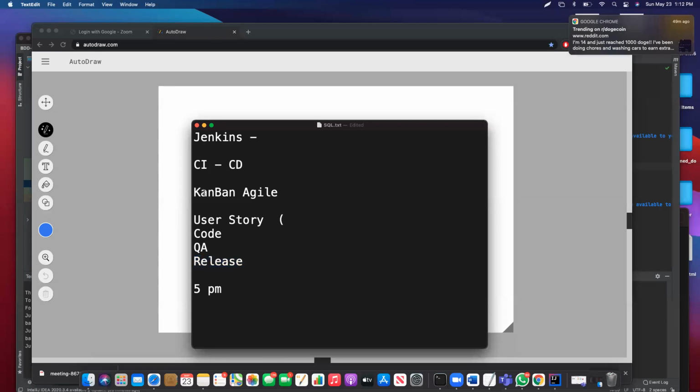In Agile, same thing happening, but we are not going to release the same day. We're going to release in 2 weeks, right? After 2 weeks, but we take stories and gather and put them into a specific QA server, test them, and then we go, right? So Kanban says, okay, you know what? We don't have to wait for 2 weeks. If I have finished one, then I will push that one.